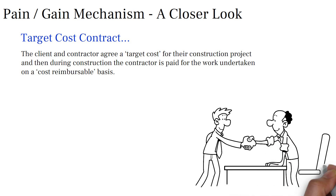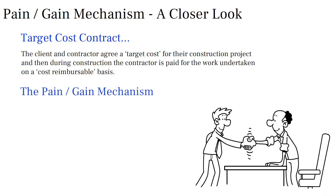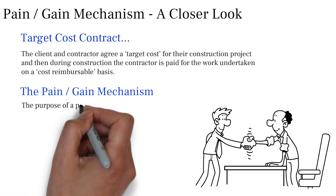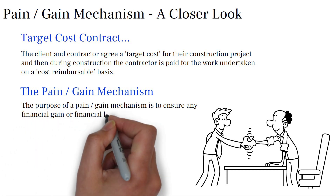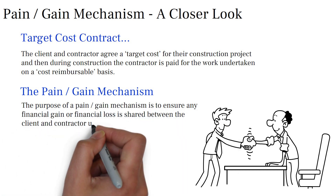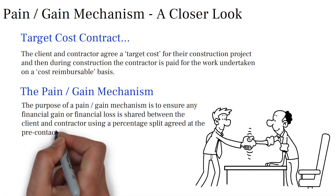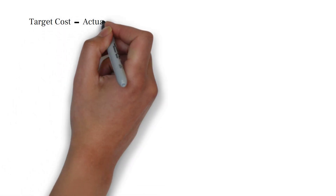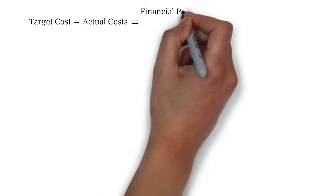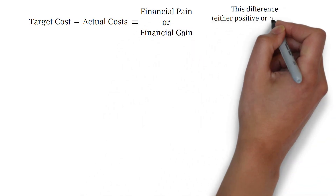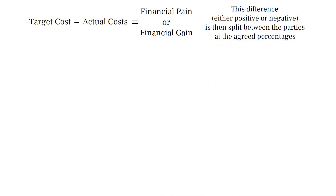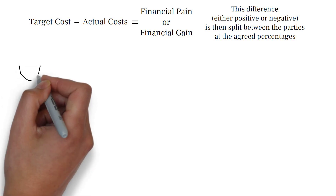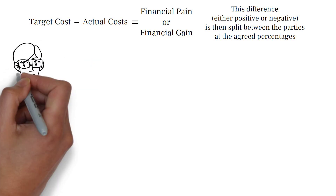So, where does pain and gain come in and how is it applied to such a contract? Essentially, the purpose of a pain gain mechanism is to ensure any financial gain or financial loss is shared between the client and contractor using a percentage split agreed at the pre-contract stage. This is calculated by taking the agreed target cost and deducting the actual cost incurred throughout the length of the project. The difference is then split between the parties by the agreed percentages. The agreed target cost may of course increase or decrease due to variations during the project through compensation events. Financial pain or gain is usually calculated once works are complete and reflected in the final payment and final account.